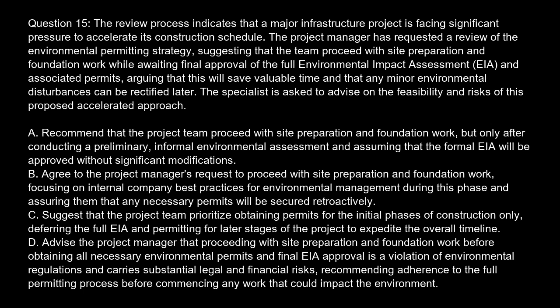Option C. Suggest that the project team prioritize obtaining permits for the initial phases of construction only, deferring the full EIA and permitting for later stages of the project to expedite the overall timeline. Option D. Advise the project manager that proceeding with site preparation and foundation work before obtaining all necessary environmental permits and final EIA approval is a violation of environmental regulations and carries substantial legal and financial risks, recommending adherence to the full permitting process before commencing any work that could impact the environment.